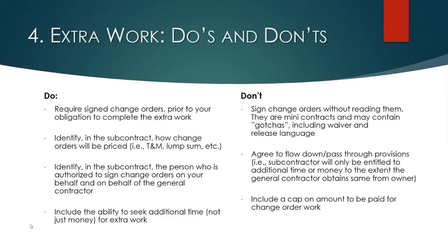We've seen change orders that people sign where it agrees that they're waiving and releasing any claims leading up to that date. Well, there are hundreds of thousands of dollars of claims that have not been resolved that prior to that change order had been reserved, but now we've got a change order from somebody saying that they've released it. That becomes an issue.